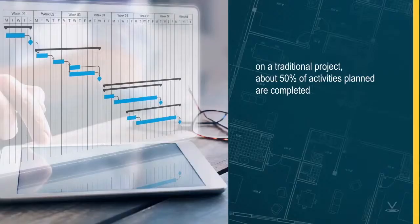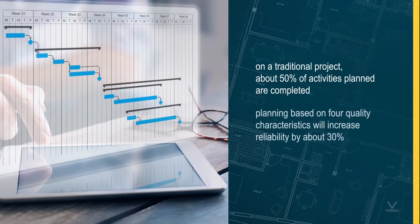Work assignments that are made accounting for these considerations will be much more likely to be completed as planned than if such considerations are not adhered to. This can be verified by measuring the effectiveness of planning, which is accomplished by comparing, at the end of the planning cycle, the number of activities that were indeed completed to the number of activities planned. On a traditional project, about 50 percent of the activities planned are completed. Research has shown that planning based on the four quality characteristics will generally increase reliability by about 30 percent.